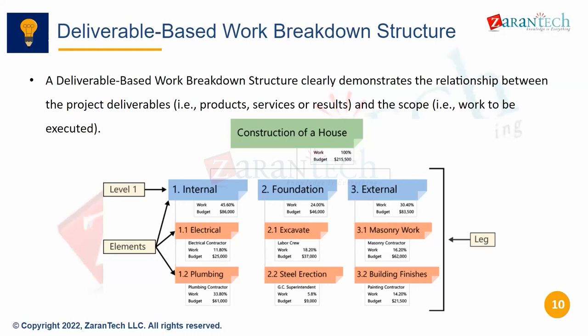So Khalid, in short, we must have WBS as our primary thing for the PS structure. Correct. We must have. Or is there a scenario where we can jump directly to the activities, meaning we can ignore the WBS at the top level and proceed further on that side? That is very rare, but I will take that example also. Usually it is in assembly processing type scenarios, wherein we have a sales order, and from the sales order we are triggering projects as per what assembly we want to create.